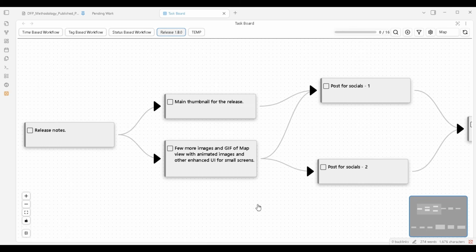And since I have put this main thumbnail task on top, I will start working on it first. But if I look at my map, I can also see that, coincidentally, this task is a child task of two parent tasks in the next stage. That means this child task is blocking two other tasks. Hence this task should be completed properly and as soon as possible, so I can free the flow of the project and can start with the rest of the later tasks at any time.